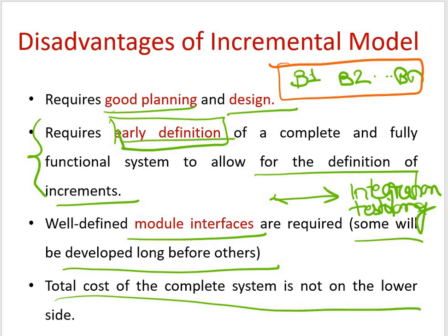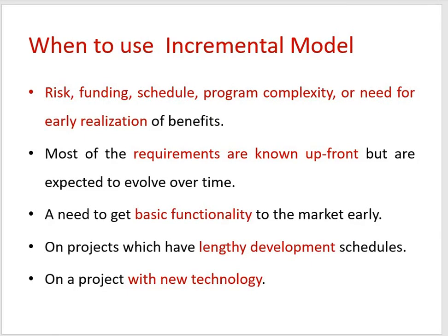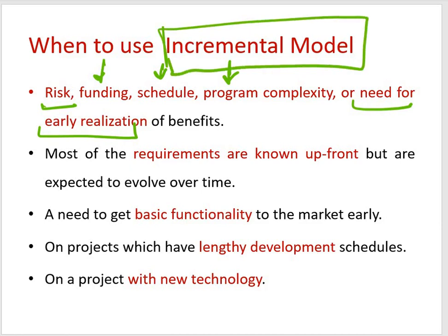Now, after looking at all these pros and cons of the incremental model, the question arises: when should I use this incremental model? Whenever you have risk, funding, schedule or program complexity concerns, or you need an idea about the early outcome of benefits, then go ahead with this particular incremental model.